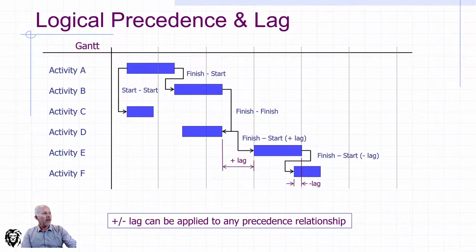And harnessing your precedents and then using the information it gives you effectively when you're tracking through the execution of your project, because you now have your critical path. You know that in all likelihood you want to protect your critical path in all instances. You have information about the slack or the maneuver room you have with your non-critical activities. And keep in mind, this is still fairly unconstrained because we haven't overlaid resources yet onto our schedule. And so that's the next step, is to overlay resources.